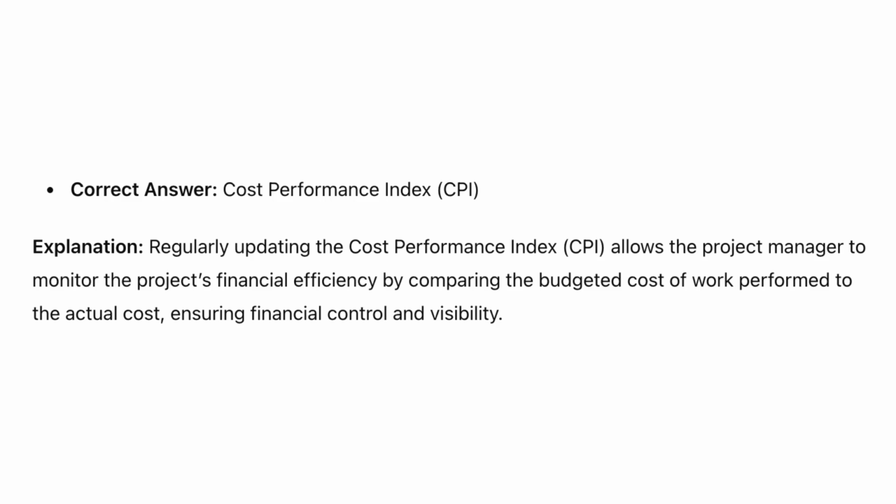Correct answer: Cost Performance Index (CPI). Explanation: regularly updating the Cost Performance Index (CPI) allows the project manager to monitor the project's financial efficiency by comparing the budgeted cost of work performed to the actual cost, ensuring financial control and visibility.